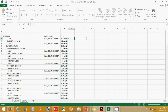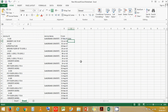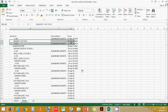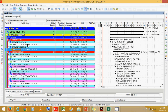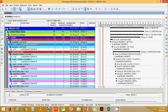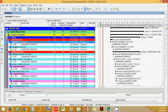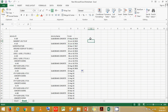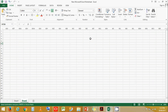Now let's convert this date directly using the TEXT function with month and year format and close the bracket. What happens over here is that the date at the activity level is being reflected at the WBS level. So when we copy it into Excel, the activity date is being reflected at the WBS summary level.